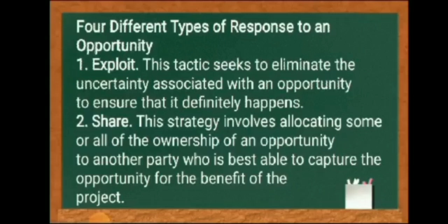Number two, share. This strategy involves allocating some or all of the ownership of an opportunity to another party who is best able to capture the opportunity for the benefit of the project.